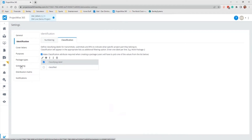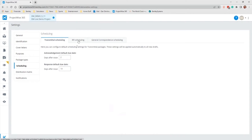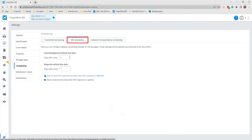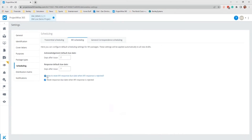The next area I want to cover is scheduling. You can set deliverables management to send notifications on scheduled periods — like acknowledgement and default due date. For example, you're required to acknowledge after two days and required to respond after 14 days. You can change these to whatever timing you would like, and you have the same options for RFIs and general correspondence. There are also built-in directions on how to modify these settings for extra notes.